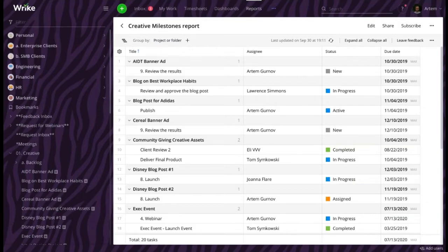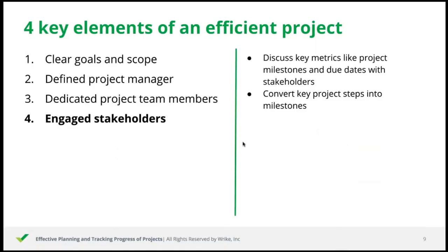So, also with the stakeholders that are going to be involved into the project, you need to agree on the format of getting updates and periodicity of these updates. Adding these stakeholders as collaborators would be a good choice, because they will be able to get the updates themselves. Because as you know, collaborators are also able to subscribe to the reports that have been shared with them.